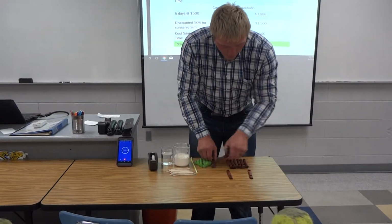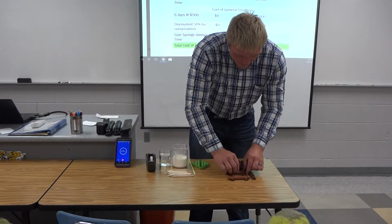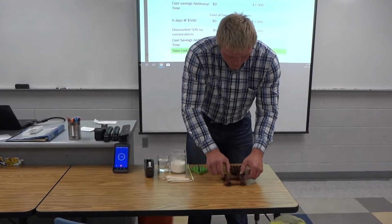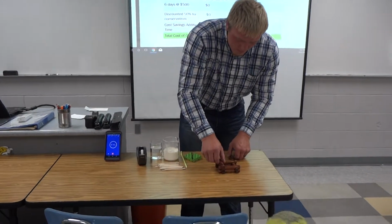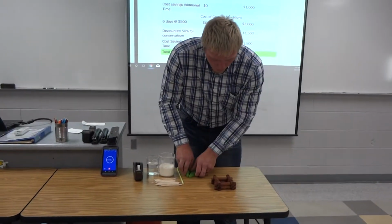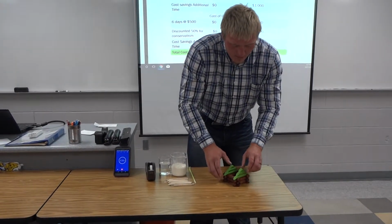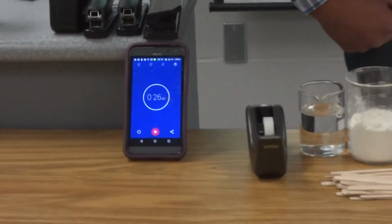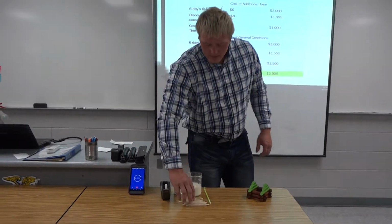So with precast concrete, you can order the concrete, and when it's finished, you can have it delivered to the job site, and it's ready to be installed. It's really easy. There's no time to wait for the concrete to strengthen, and it really makes the installation quick and easy. That took me 26 seconds to build, and that was the precast concrete, while this is the cast in place.